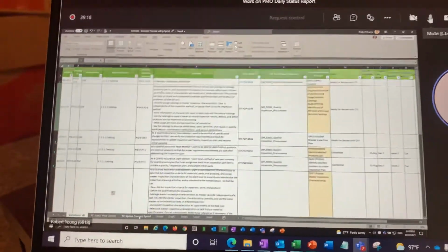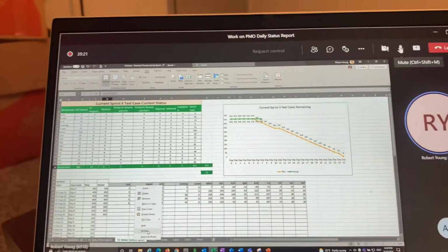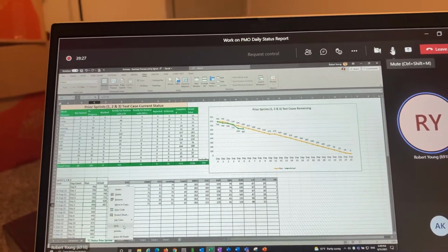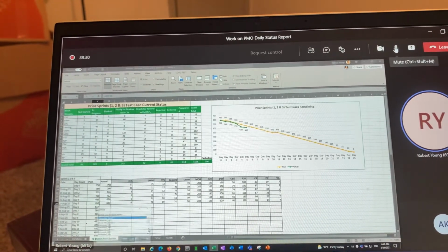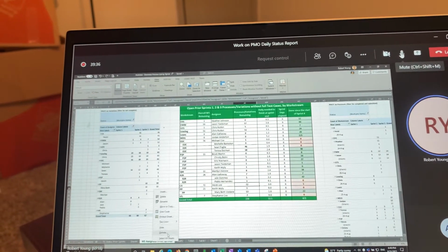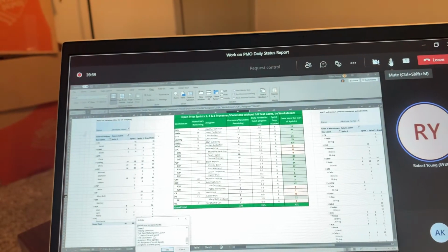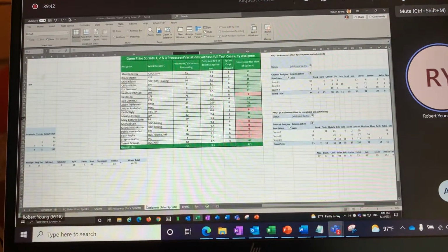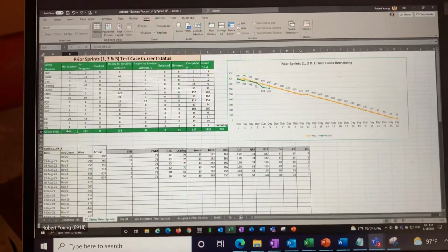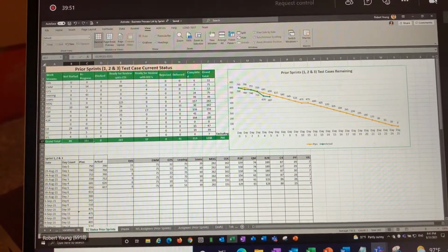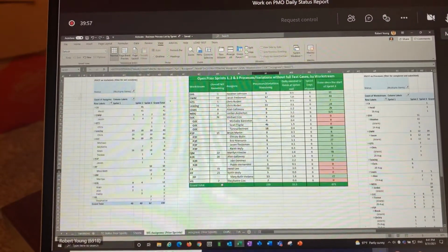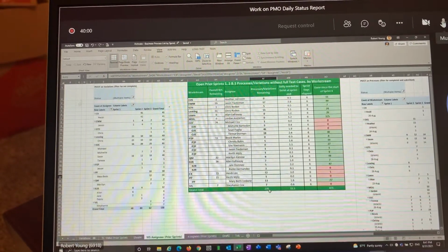Okay, temporarily I'm going to hide current sprint. I'm going to open the WS assignees and the assignees tabs for prior sprints so we can work on those. Okay, so one of the checks that we need to do is that the number between not started and in progress, which is 263, once we do the updates on this tab, should also be 263 here, right?